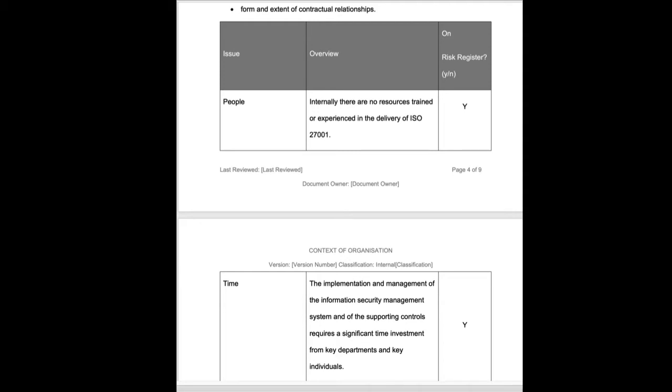Here where we say people, internally there are no resources trained or experienced in the delivery. In that case we're going to add an item onto the risk register and manage it through risk management. But alternatively, internally there may well be resources trained and experienced, and to show that we have considered it, we would also put in the positive answer.